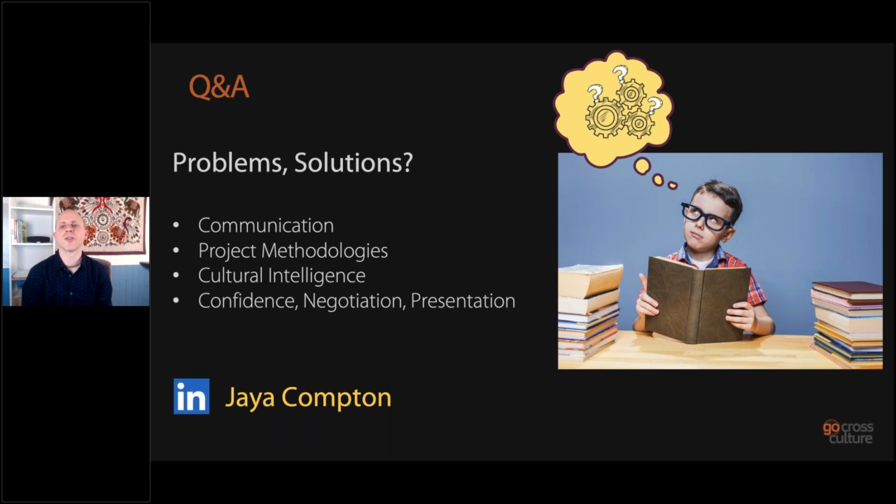Risks and issues, generally what I find on projects is risks go in a risk register and they're reviewed every quarter or whatever the process of the organization is. Nobody really seems to ever deal with them a lot of the time, at least from my experience, and that's probably in bigger organizations. But risks and issues should be raised as part of the daily stand-up if we've got some risks with this implementation, with this sprint. If we can keep risks and issues to a particular sprint, they will get dealt with. The Scrum Master's job is to help try and solve those.